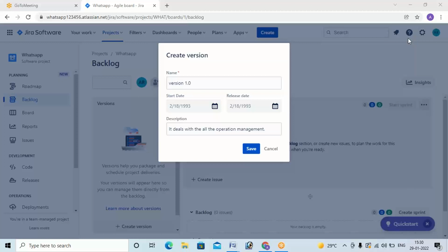See, first the development team is going to develop all the requirements in the form of coding. Once it has been done, the developer team is going to push that to the testing stage, where the testers are going to check all the requirements. If they find any kind of errors, they will revert it back to the developers as tickets. If no bug is found during execution, then finally it will proceed to the BA or a Scrum Master, you can say.